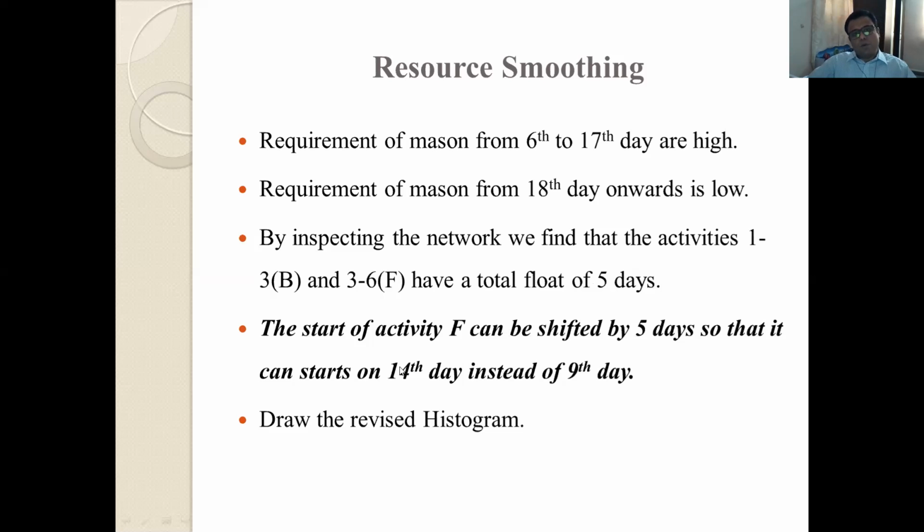So what we will do here, students please note carefully: the start of activity F can be shifted by 5 days so that it can start on the 14th day instead of the 9th day. That is, the start of activity F is on the 9th day, but we will shift the start of that activity by 5 days, because we have 5 days of float available there.